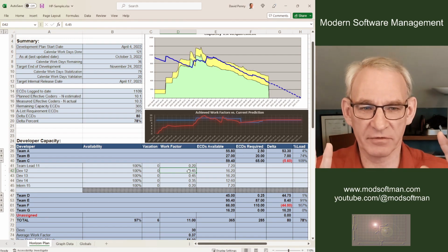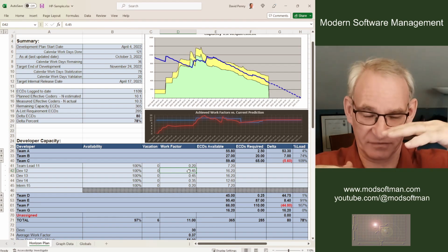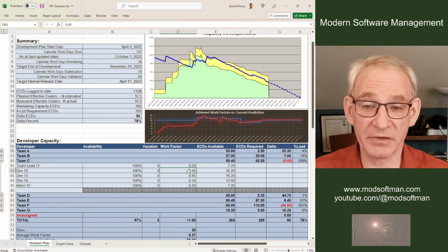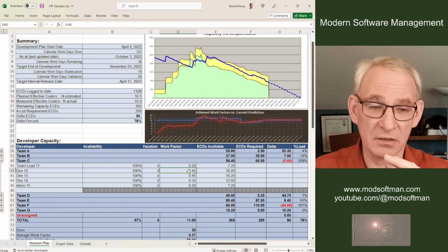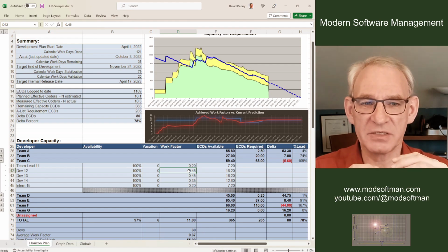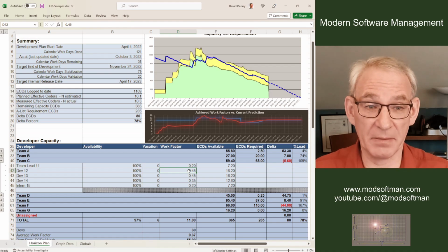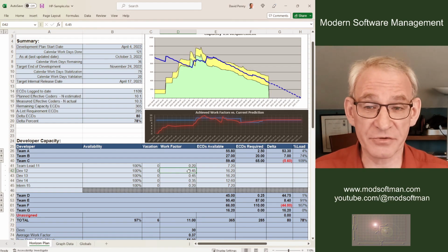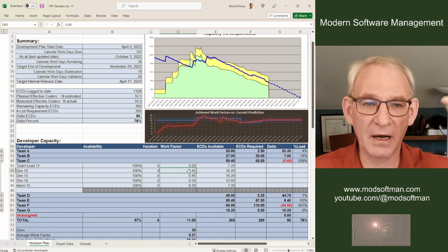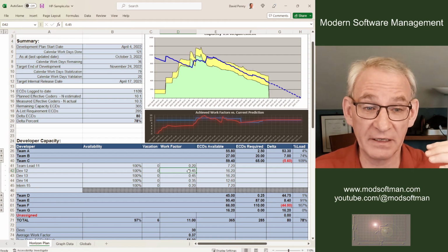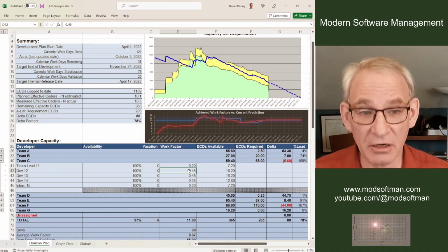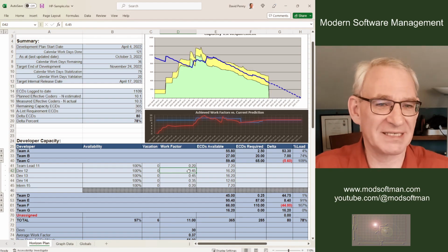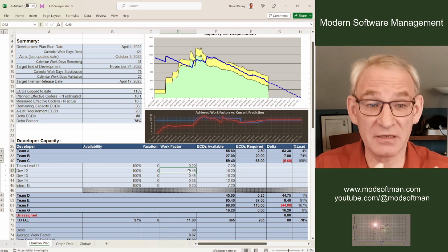No. First of all, it's an unrealistic 8 hours of solid coding, right? So nobody does that. This is only individual contributor time. So any time spent in meetings, coordinating with other people, any time spent seeking help or giving help to other people on the team, none of that's included. If they're ill at any point of the time, that's deducted from the measured work factors as well. If they're fixing a bug, triaging or fixing a bug that was reported from the field, or helping a customer service person, that's not included in this time as well. If they're maintaining the pipelines, that's not included. If it's a SaaS product and they're doing some production operations, that's not included.